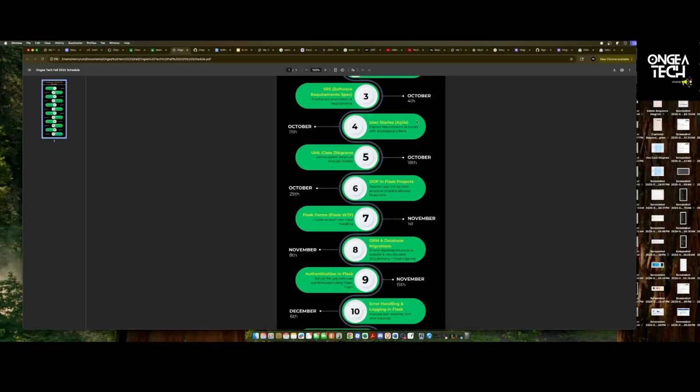So we'll ask what exactly we need to do, and once we break it down, we decide: okay, we'll have it as a filter, or we can also have it as a different page, and this is how we think it could look. That means that in that sprint, we need to come up with a design to see exactly how it's going to look, then develop the feature the way we've decided, then implement and test, so that by the end of that sprint, we have done that story.